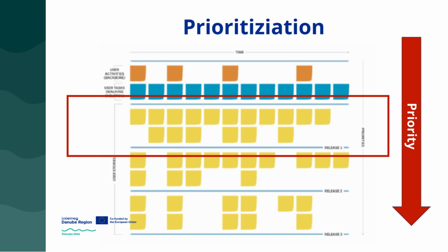Another key area where a user story map helps is in determining priority and task order. This prioritization should be understood as a step-by-step process. When we create a story map, the user story cards become the basis for the development team to carry out the tasks described on them. The team is able to estimate the size of each task, and based on this estimation, they can compare user story cards to determine how much can realistically be completed within a given time frame.